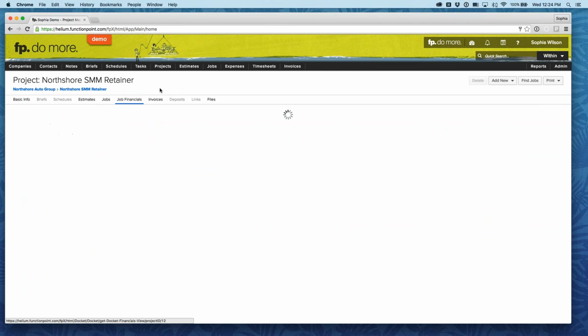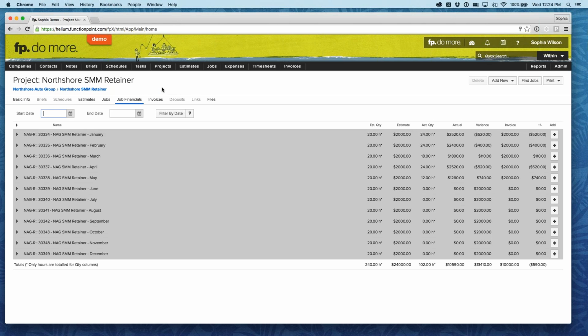So in this scenario I'm about to show you, we bill at the start of the month. So at the end of May, when I open up the June job, whether it's June 1st or May 31st, the first thing I do is I invoice it. I send my client an invoice, and they get an invoice on June 1st, and it says, here's an invoice covering the SMM retainer for the month of June. So we bill in advance.